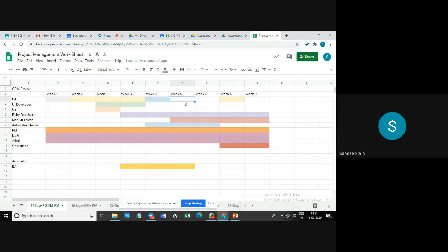See, there might be a tendency for the project manager to keep a resource longer than necessary because the customer might schedule a meeting even though the work is over for that particular resource. So if there's a meeting scheduled for requirements for any reason, even if the requirements collection is over in week 4, now what does the project manager do? Because he would need to get the BA into the meeting. Okay, so the project manager, the customers, they can call for meetings at any point of time. This is a very hypothetical example I've given.